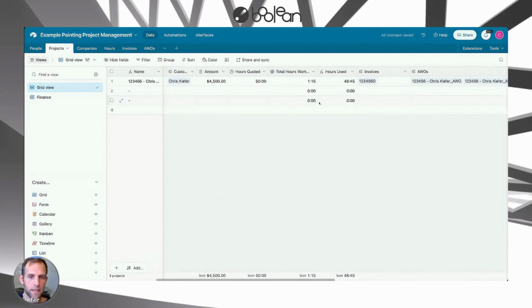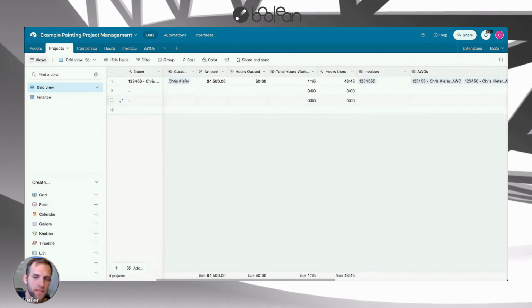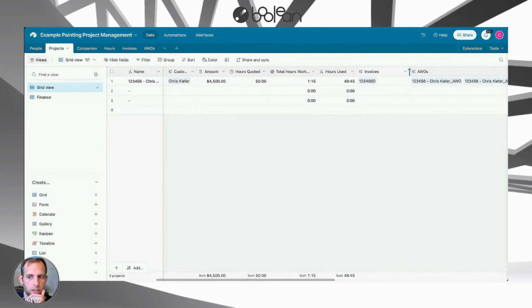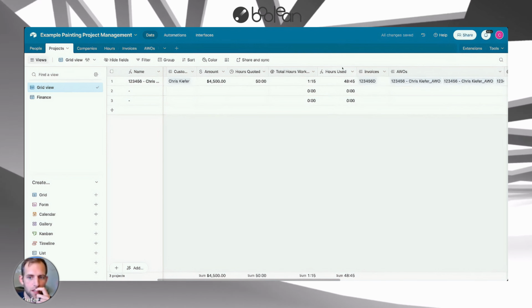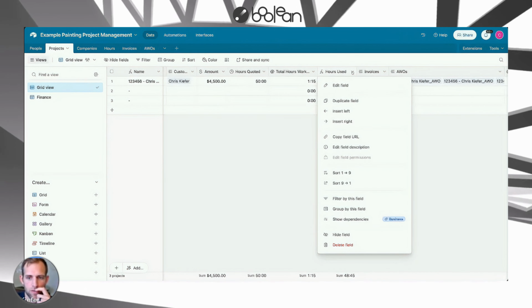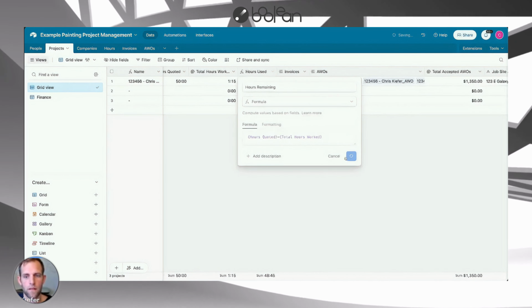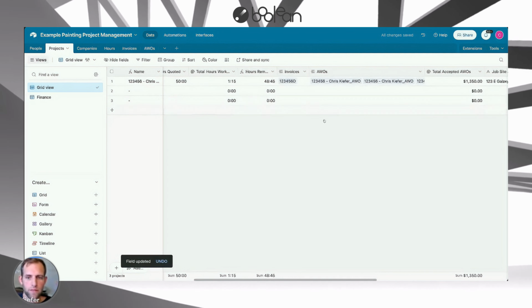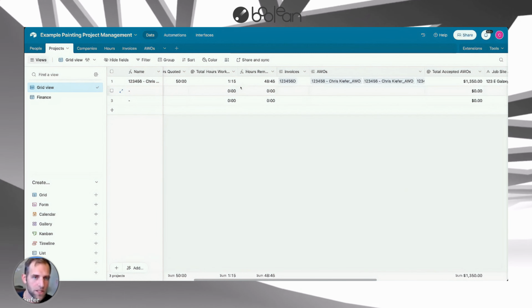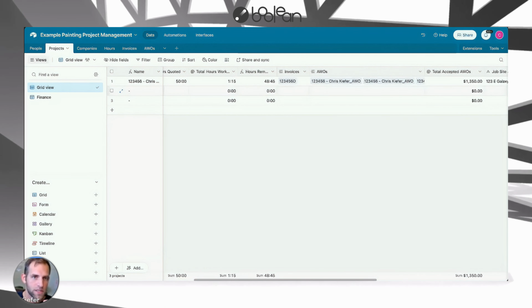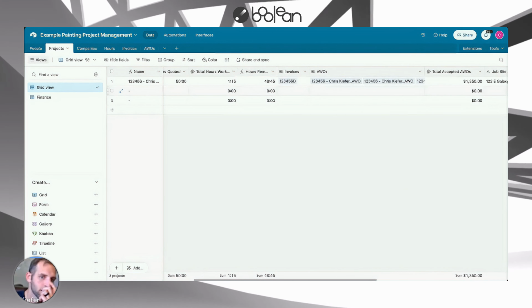It just requires intentionality in how you're setting it up so that you could then map it all the way through the process to see how you want it to be presented to the person. And you could do just like I did for hours used, or I guess this would be hours remaining, not hours used. But anyway, you could do the same thing if there's a material thing, where by default we say that 20% of the budget is material budget, and then how many invoices have come in for supplies, and then we have the remaining percentage that is there.